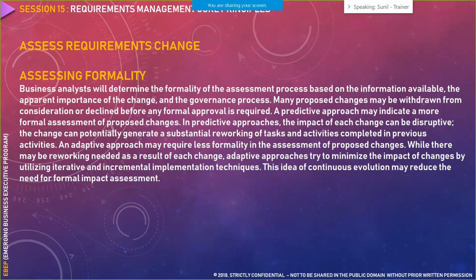So a predictive approach may indicate a more formal assessment. Now, predictive approach is nothing but your waterfall approach. You have to assess the formality first. Formality first means this is the time wherein if there is a change request coming in and the change request is too huge in nature and you need a few extra resources to complete it, you have to justify why you need that extra resource.